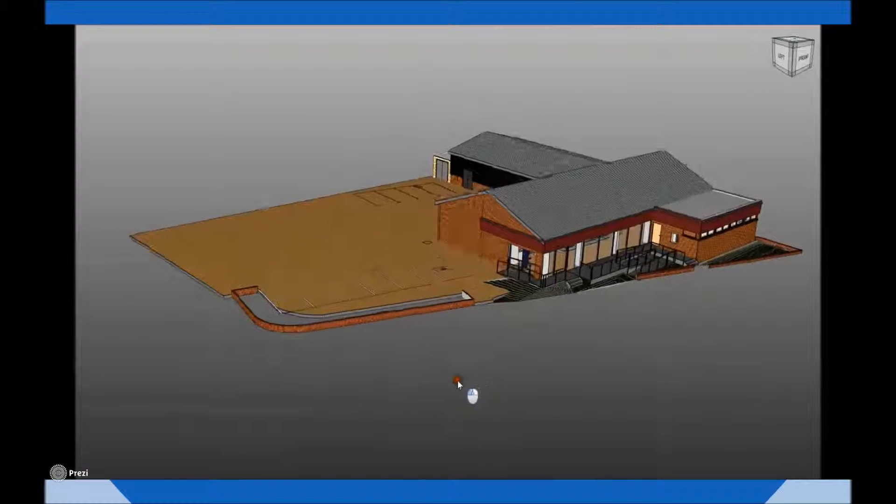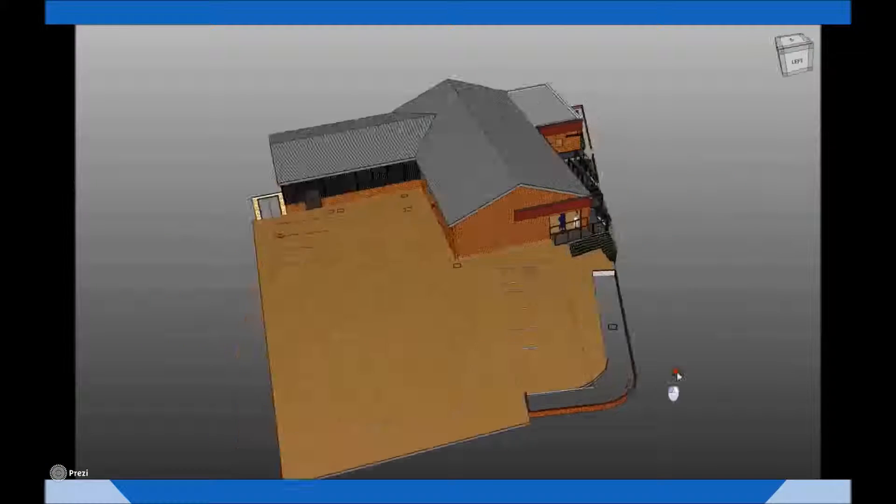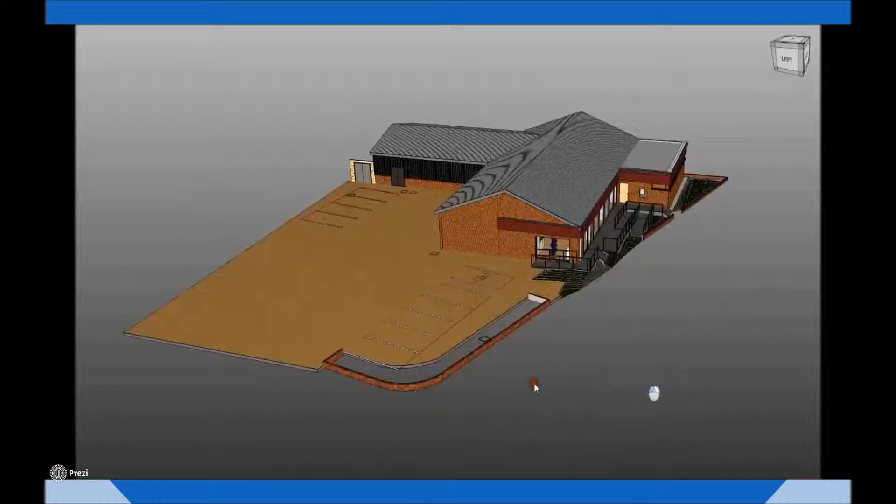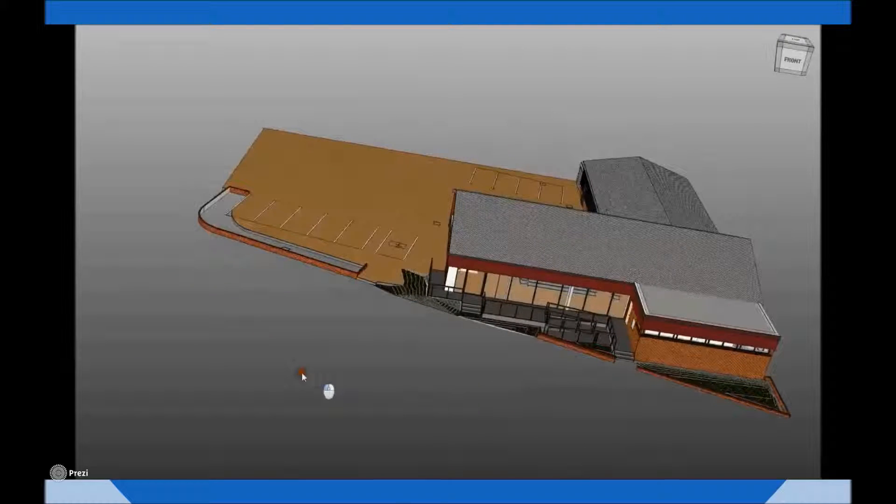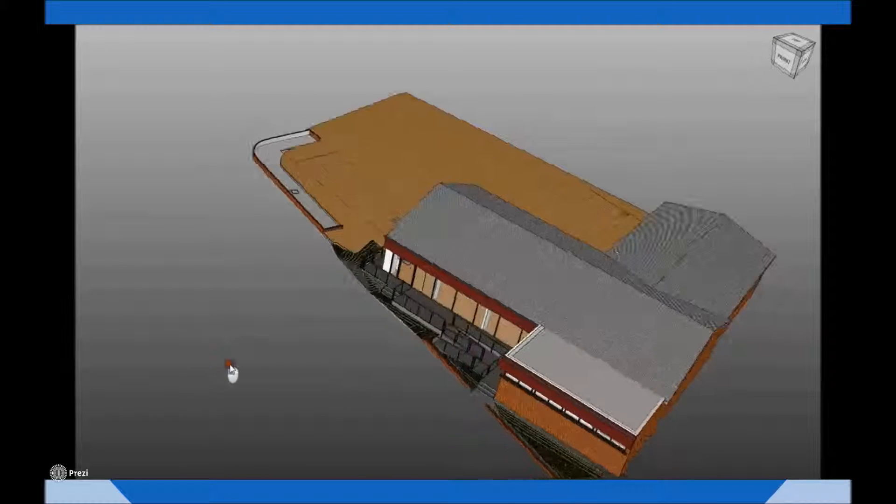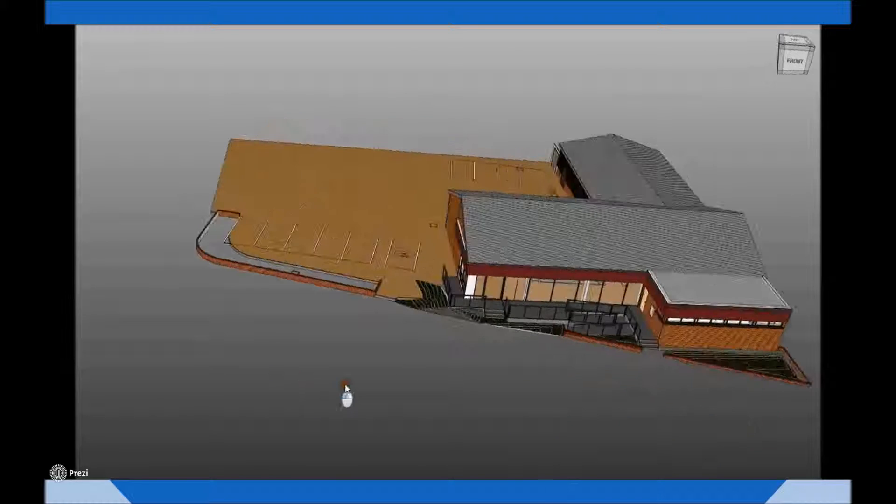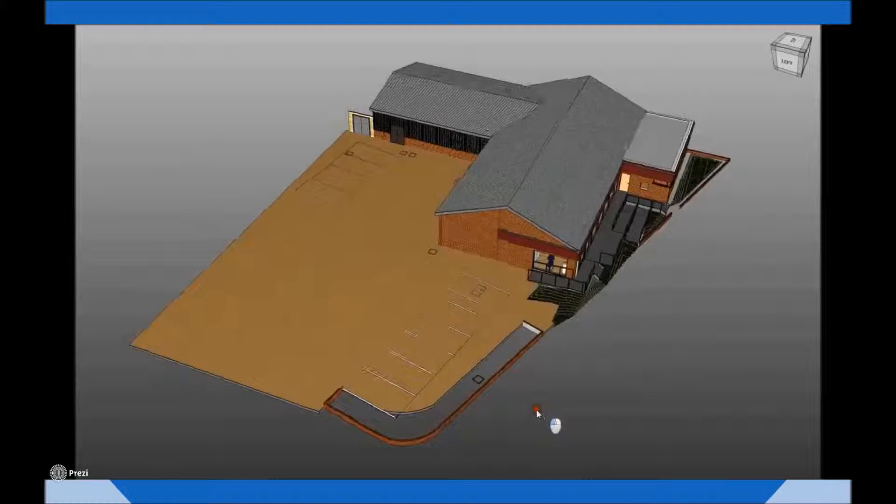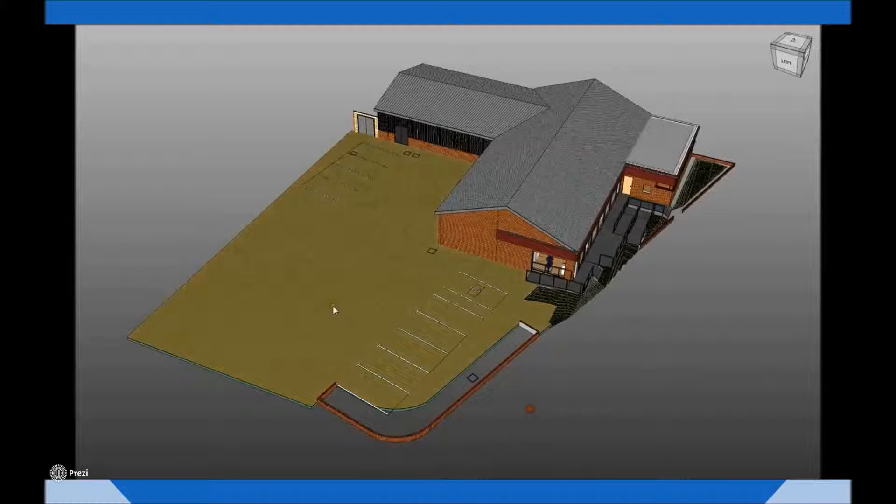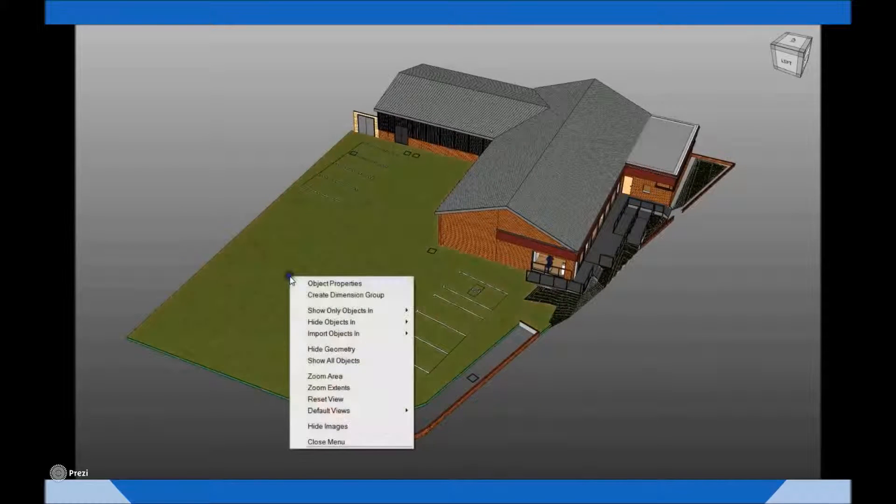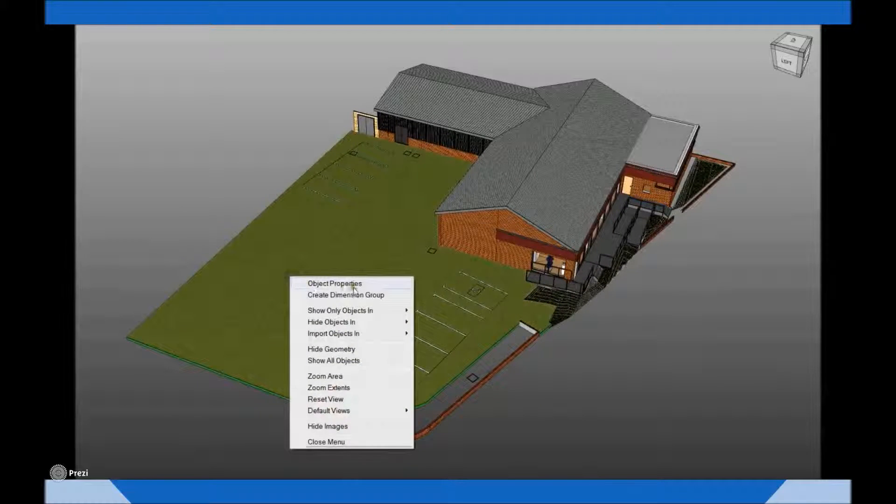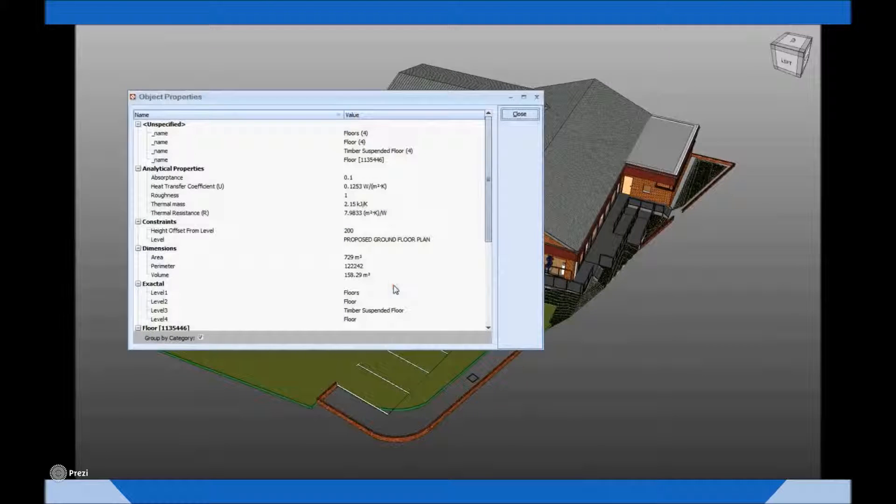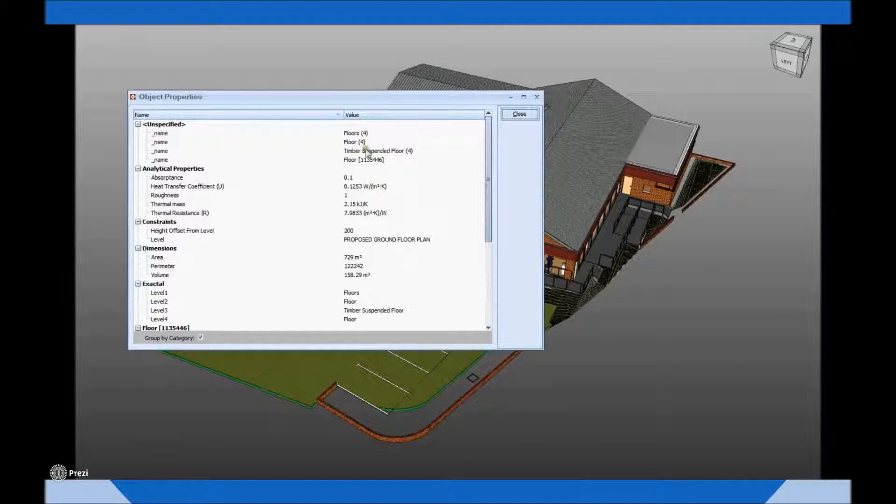This first clip indicates a fairly typical town centre unit with associated external car parking. On interrogation of the object properties for the purposes of pulling together the cost plan, it was noted that the car park has in fact been modeled as a timber floor.